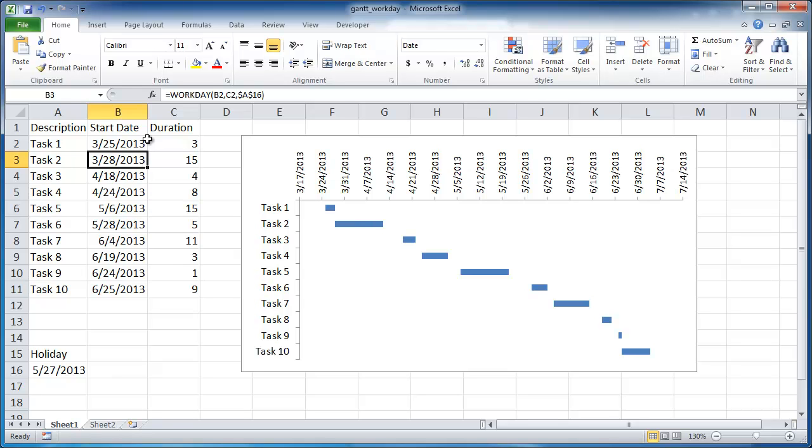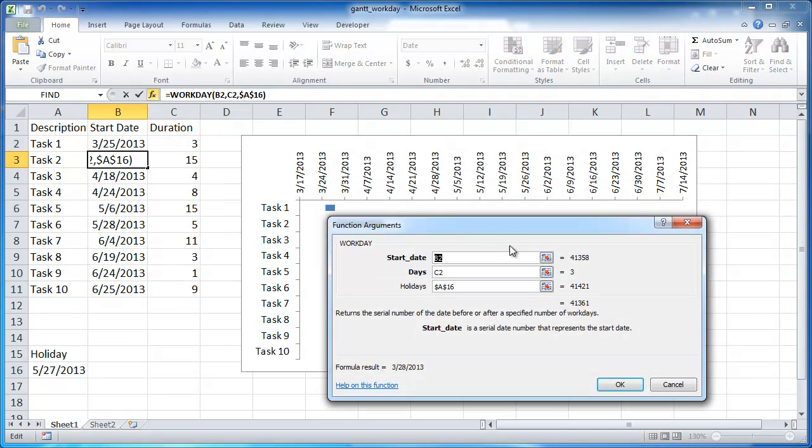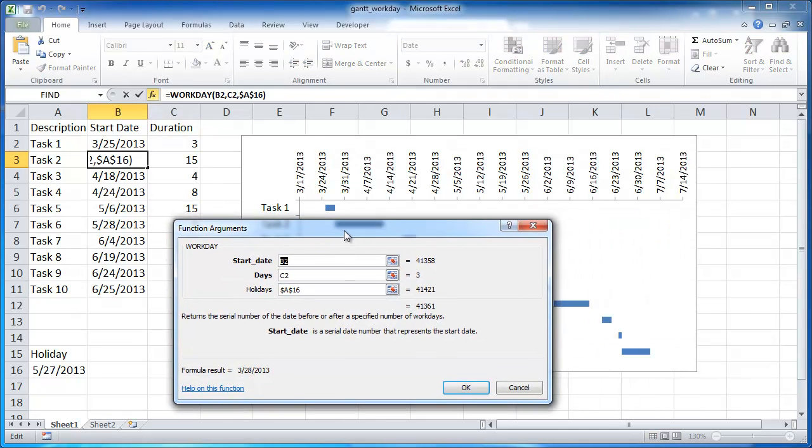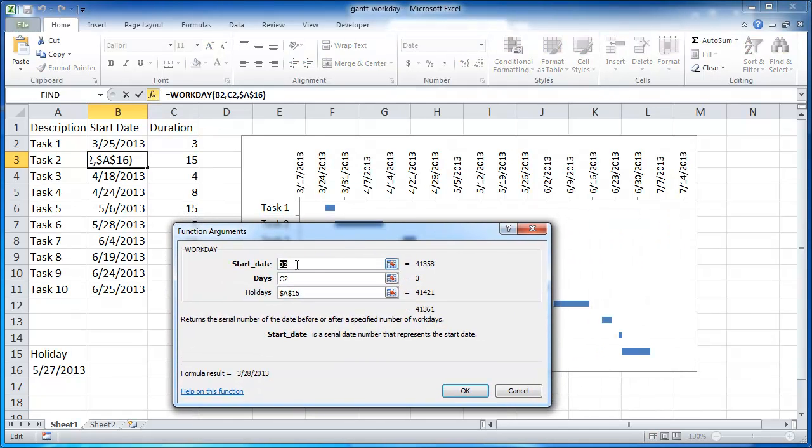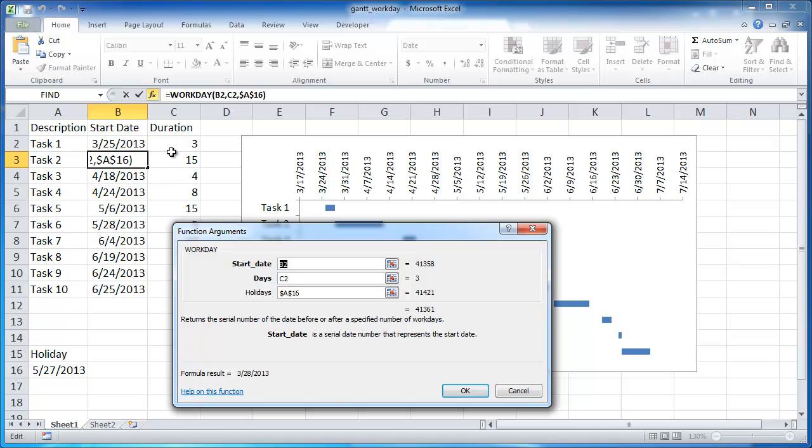So the way that the formula works, let me bring up the insert function window here. You can see that the arguments that you need to put in is the start date. For this example in cell B3, we're looking at the start date of B2 which is this one, and we're adding the days which is C2 here. So we're adding three days to here and we're going to add that holiday. I'll explain the holiday a little bit later.